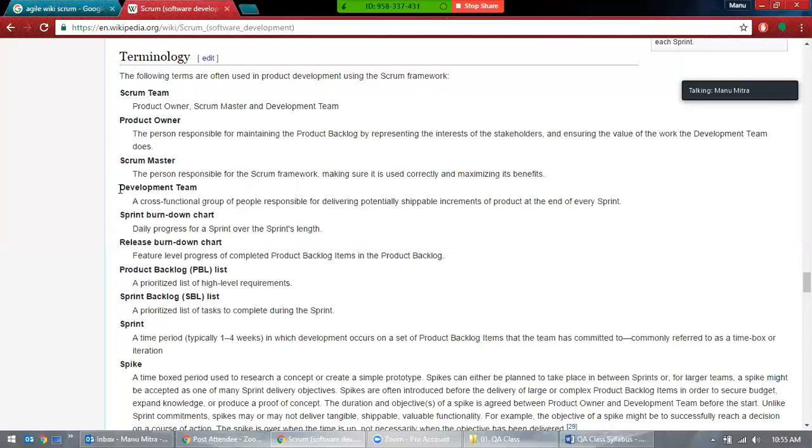Then let's come to the development team. We may not have all the developers in one team. Let's say you are in one Scrum team, Scrum team 1. You'll have, let's say, 3 developers, 2 testers, and 1 Scrum Master. That's 6 members, and that's fine. We don't want more than 5 to 6 members. In Agile, we want a small team for better productivity.